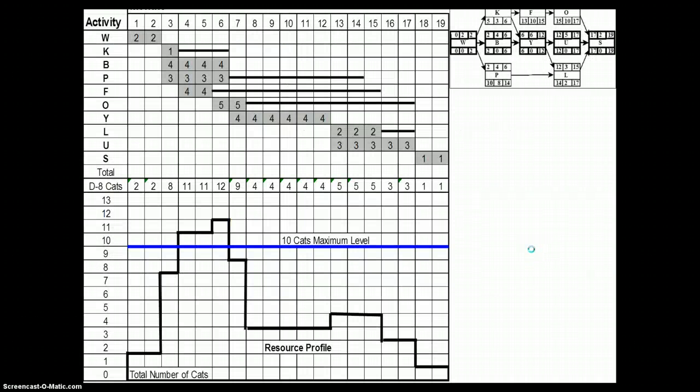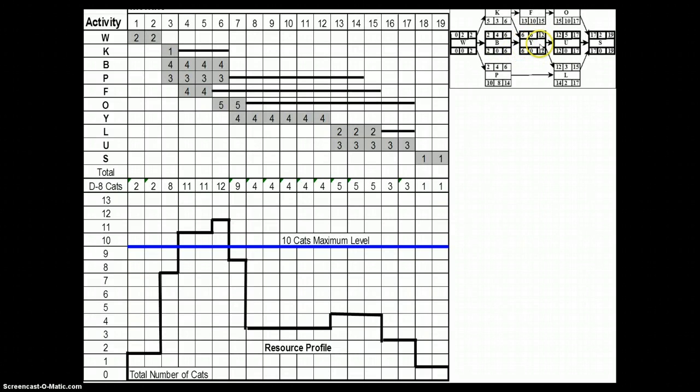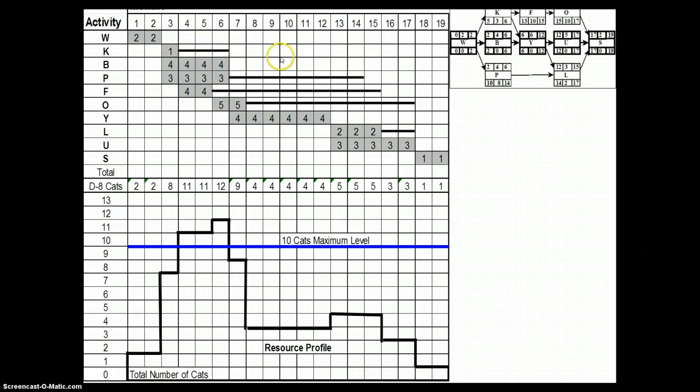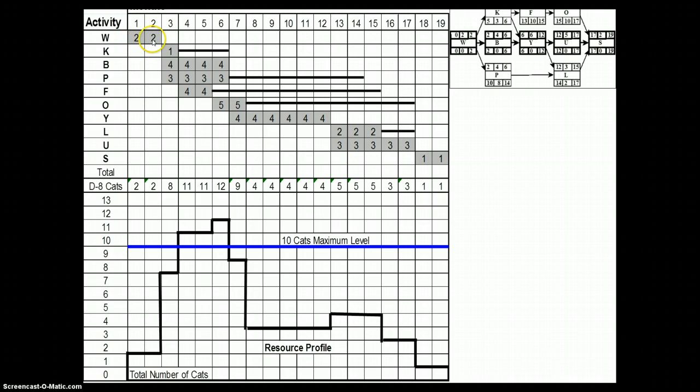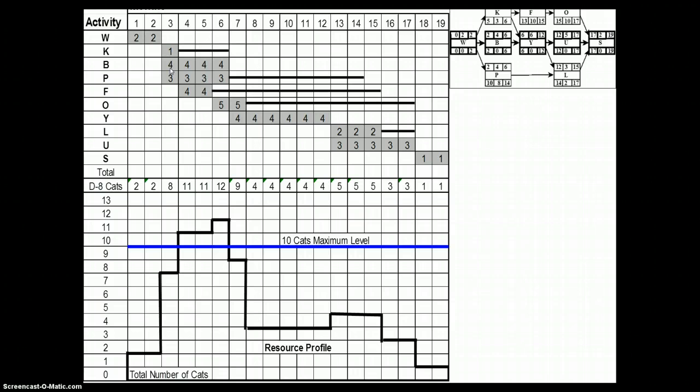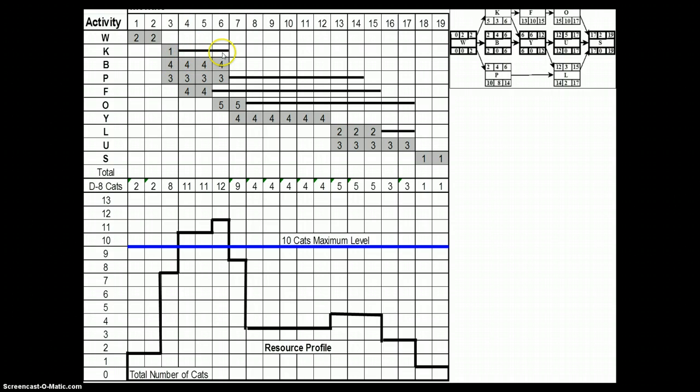Here is an example. The precedence diagram is shown here, and using the early start timings we have plotted this bar chart. You can see we have loaded the resource requirements for each task. Activity W requires two D8 caterpillars, which is the equipment we are taking as an example. Activity K requires only one D8 caterpillar machine, whereas activity B would require four throughout. The dark line indicates the float.